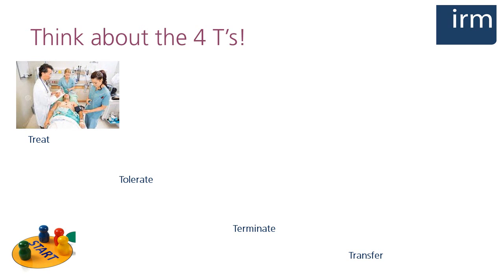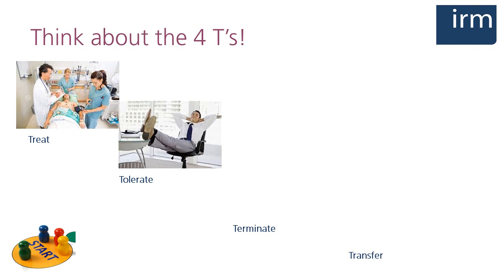That's right, and you also need to think about the specific impact on your objectives too. So if high staff turnover is a cause of you not having the capacity or skills you need for some planned work, a way of reducing the impact that has is to have succession plans in place so there's always someone to step in if someone leaves. And of course a contingency plan is essential for the most severe risks. Knowing what you're going to do if the worst happens will save you an awful lot of time running around like a headless chicken. So let's move on to tolerate.